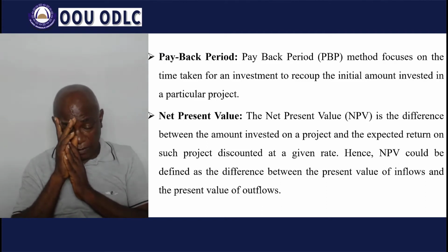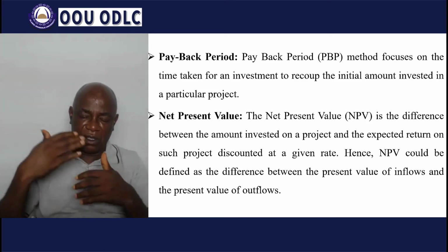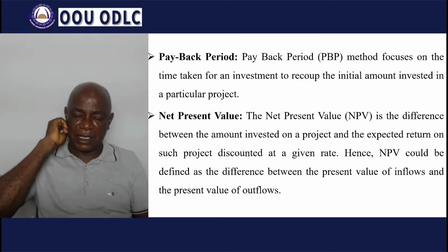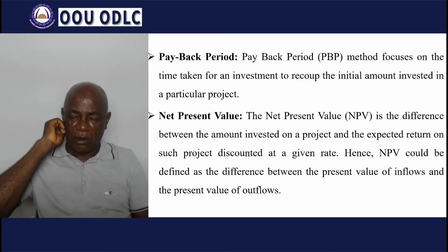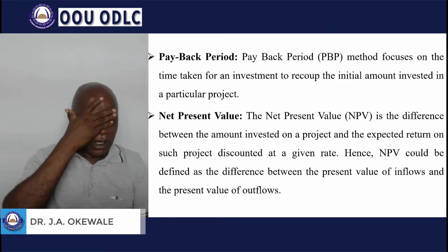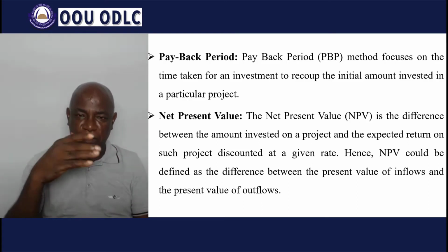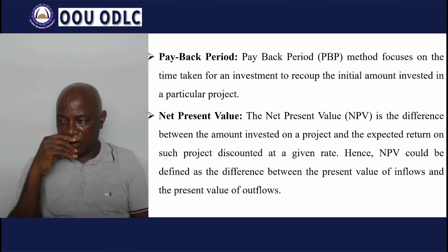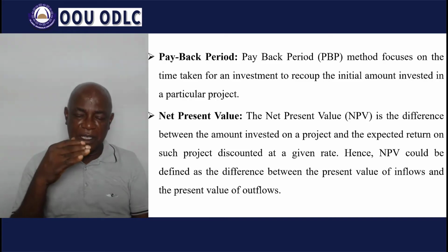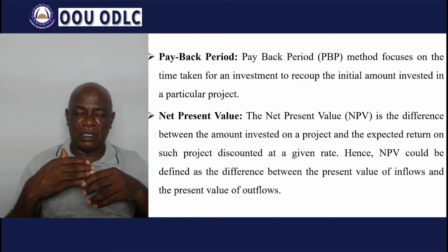But if it is an even cash flow, in other words, you are receiving a constant sum of returns over the years, to calculate the payback period under that scenario, we have to calculate what we call the amortization schedule. We have a number of columns under the schedule. You have the year, you have the cash flow, then we have the cumulative cash flow. So we now start netting off the inflows with the initial outlay as at the beginning of the project.